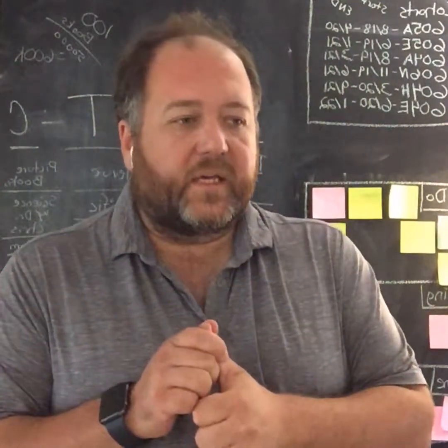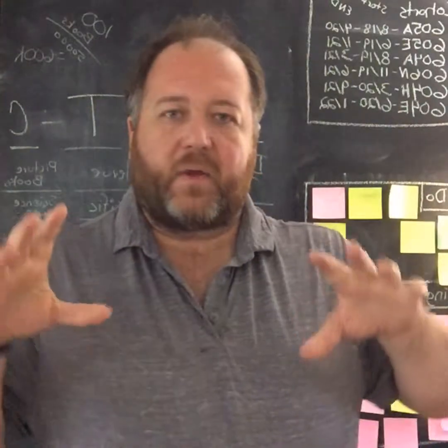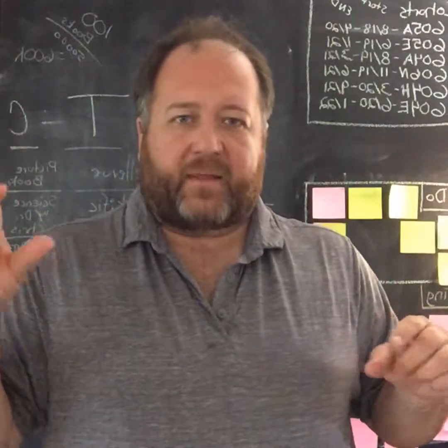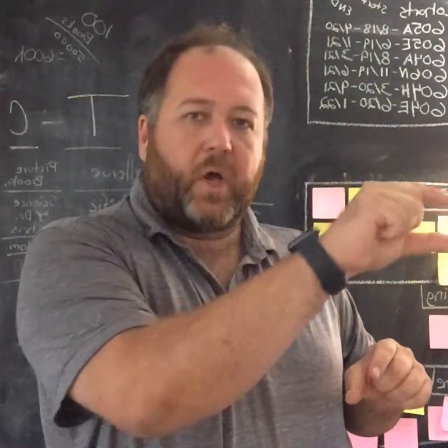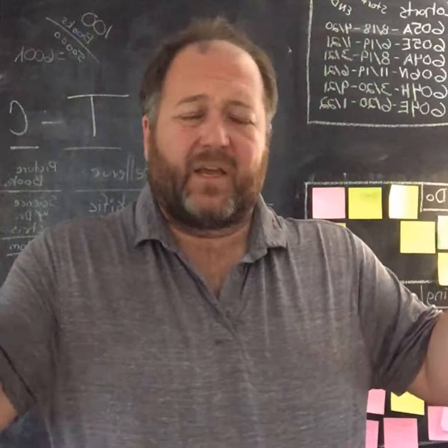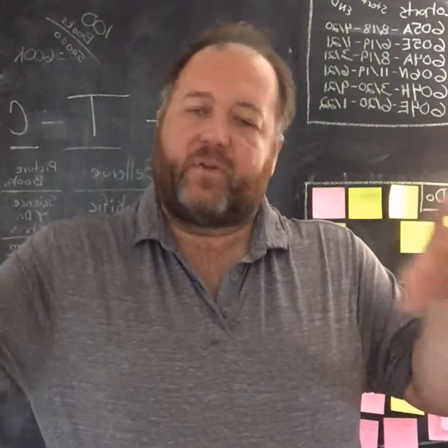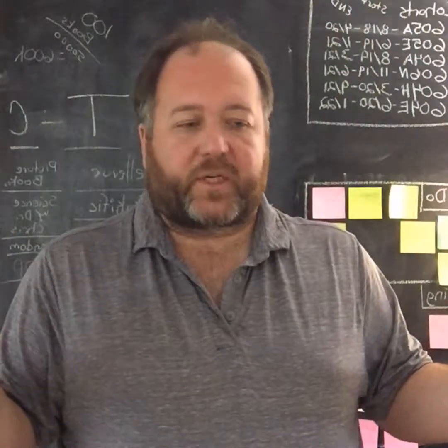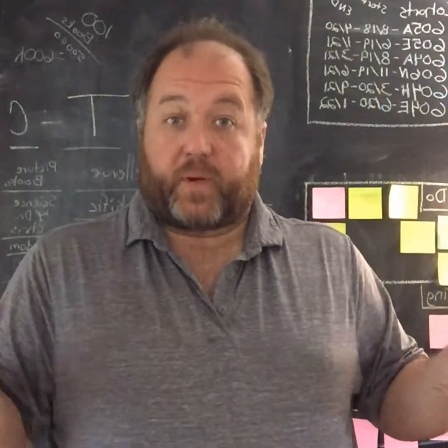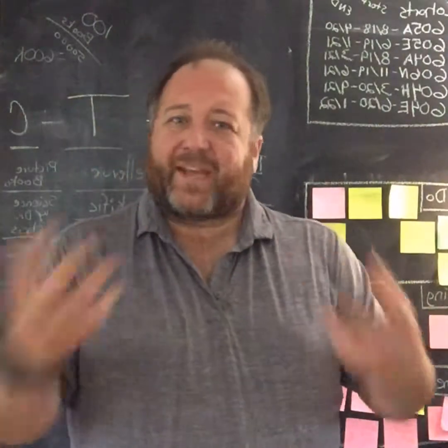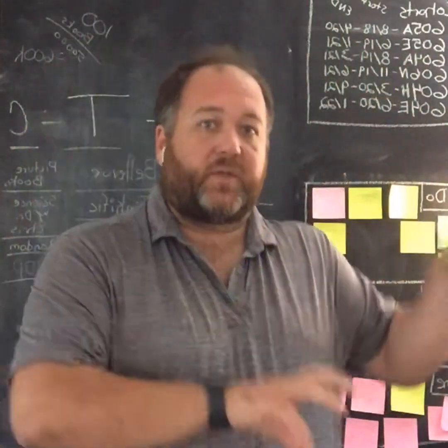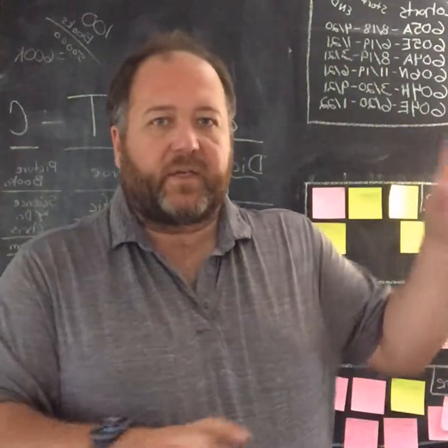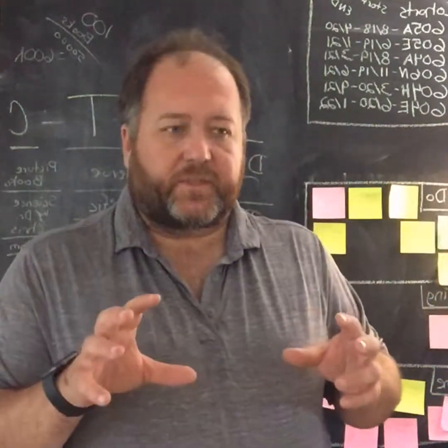The first is I watch the schedule very closely, specifically the critical path, that one flow of tasks that really sets the actual end date. And if you can optimize that, you can usually end up improving the time of the project. The other piece with the project schedule is now that you're executing the project, this is when the pieces start to move because people are people and new things come up. So you're definitely going to want to watch for those things.